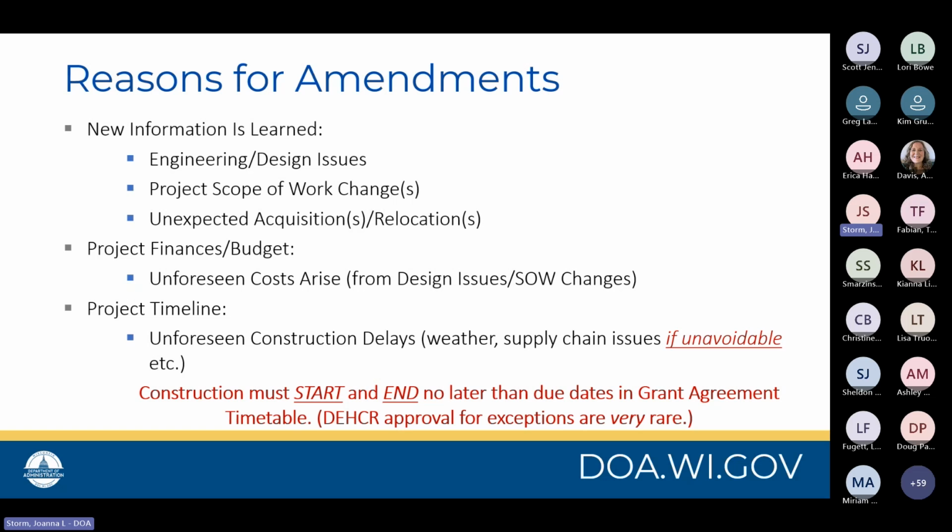The construction start date and end dates must occur no later than those listed in your grant agreement timetables. And DECR approvals for exceptions are very rare to those amendment requests.